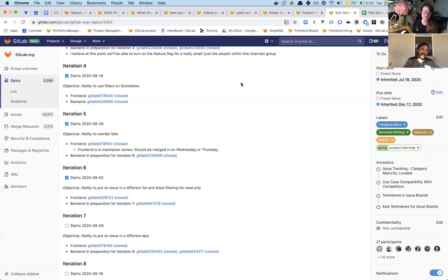And maybe that's where the back and forth comes, but sometimes it's really slow because it's more handoffs of approval. So I don't want to see that. I would love to see us collaborate more on the same iteration. But for a decent amount of the work, the pre-work, I think that should happen at least an iteration before we plan on actually building it.